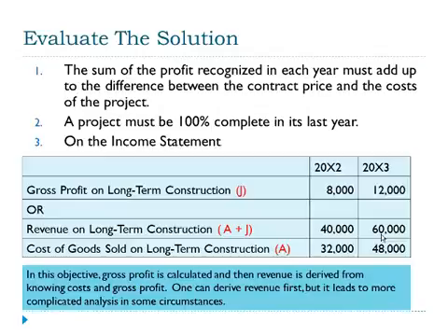The second thing to evaluate is, in the last year of the life of a project, it must be 100% complete. If you have any other percentage complete, there must either be another year in which construction continues, or you have an error in your sheet.